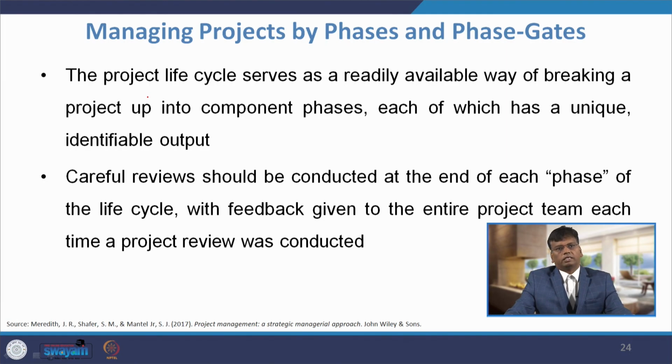So, now the question arises: how to break the project? Based on the project life cycle, we can create stage 1, stage 2, like that, and break the project into different components or different phases. Careful reviews should be conducted at the end of each phase of the life cycle, with feedback given to the entire project team each time a project review is conducted. As soon as every phase of the project is over, you have to take the feedback, and that feedback has to be informed to everyone.